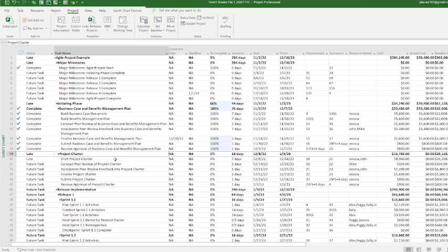You want what's naturally underneath your summary line to shift and move the summary line for you, not you forcing it to move on its own. Too many times I see people add the constraint dates to it and predecessors and successors, and guess what? It gets all funky, and then they're like, I don't know what's going on with my schedule. Oh my gosh, help me.